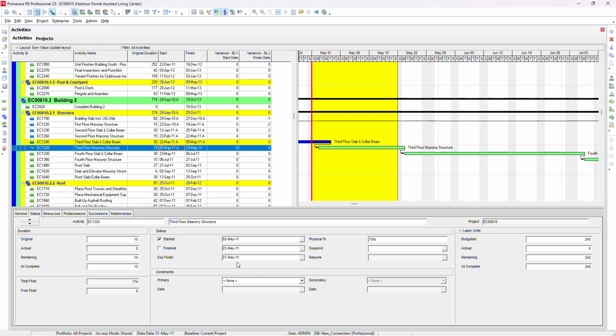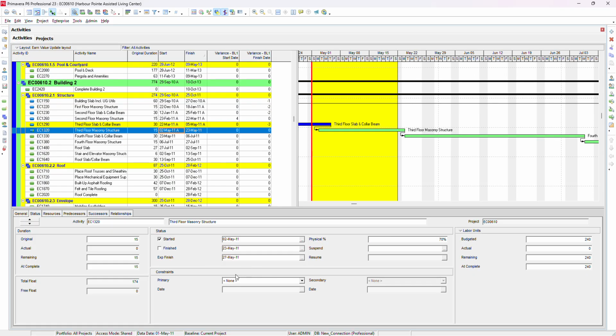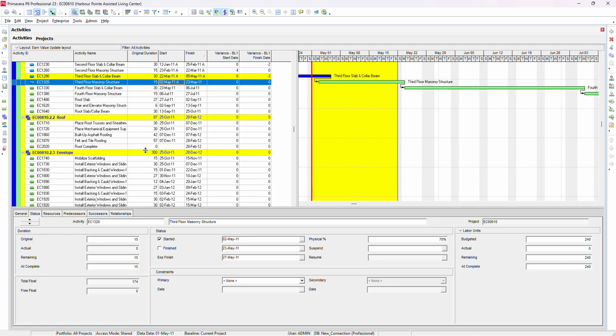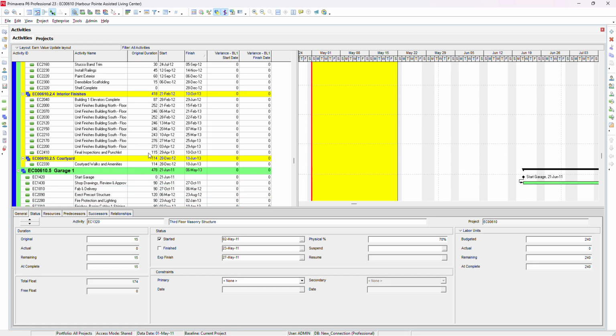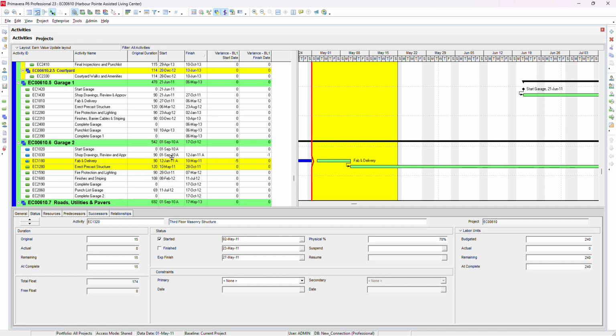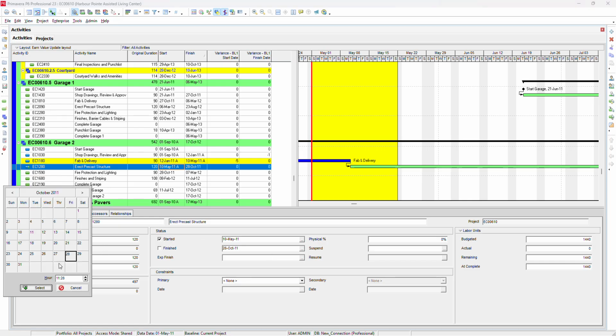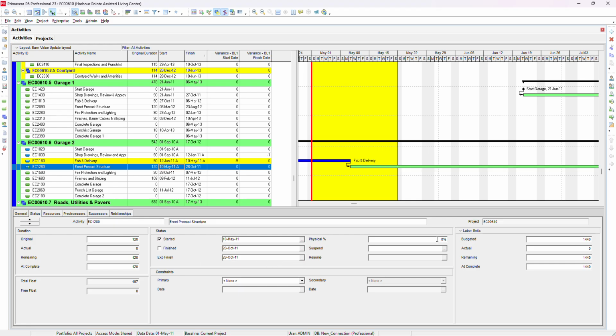To hold the date, we are keeping the expected finish date. It will calculate the remaining duration in the activities. So if you go down, here is nothing we need to update. Here, it's 10 May, it is finished. I'll just complete it. Here 10 May is started. It will not finish in time, so I'll keep it 20th October and I finish that.